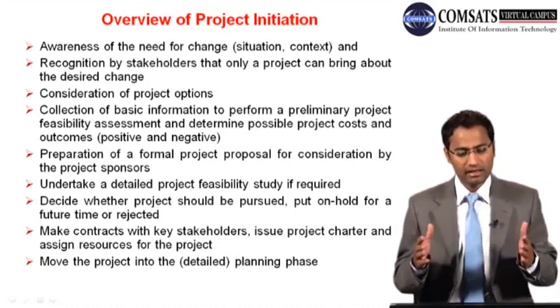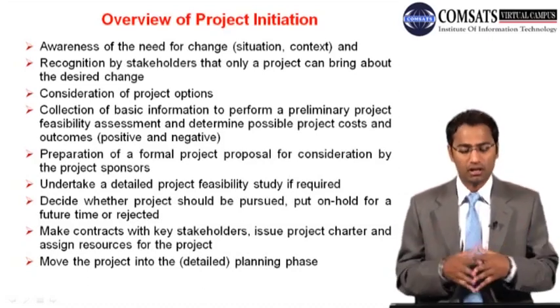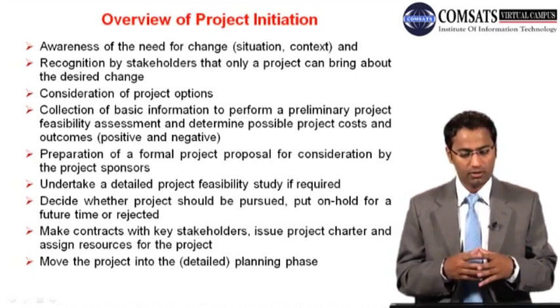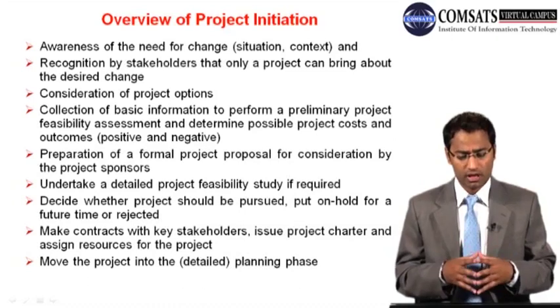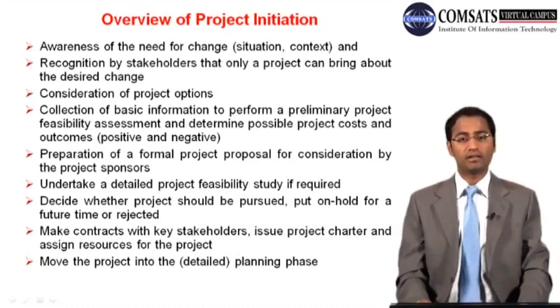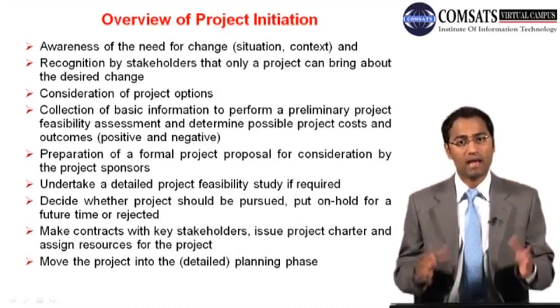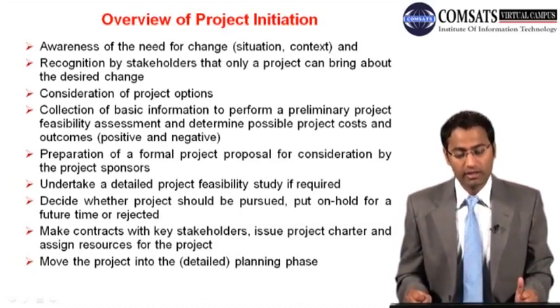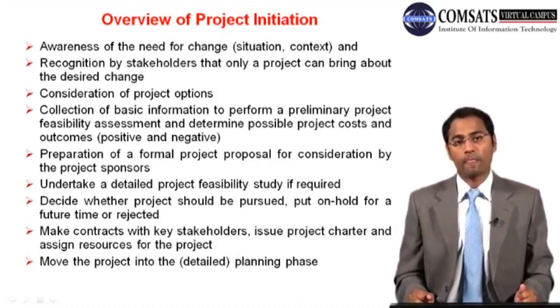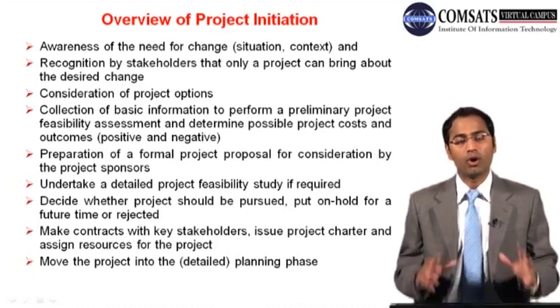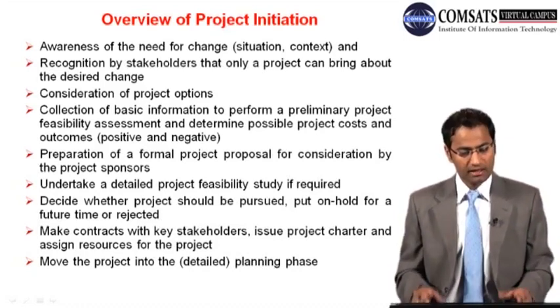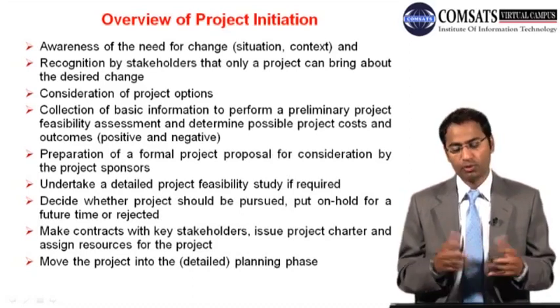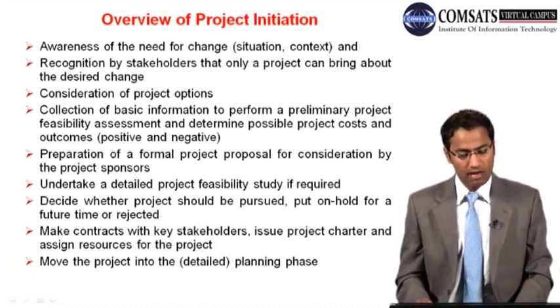And then a formal project proposal is prepared for your project sponsor. You can take up a detailed project feasibility study depending upon the complexity of the project. If your project is very complex, then you are in need of a very detailed feasibility study. At times, you even carry out all the design work in that feasibility as well. And then you decide whether the project should be pursued, put on hold for a future time, or rejected.